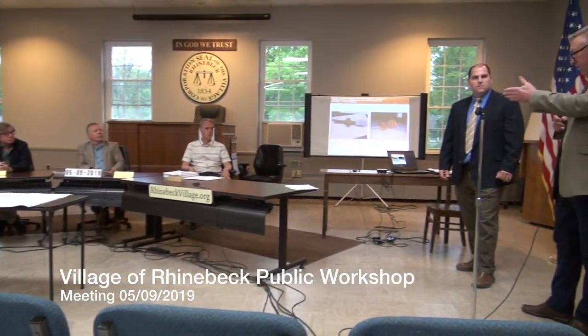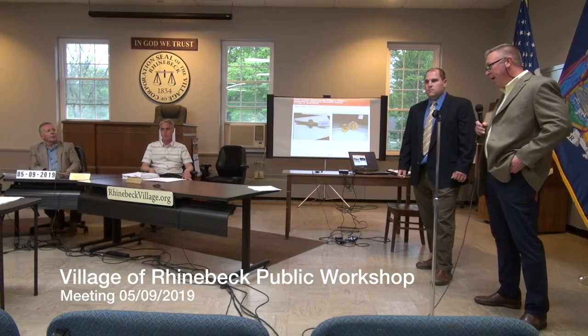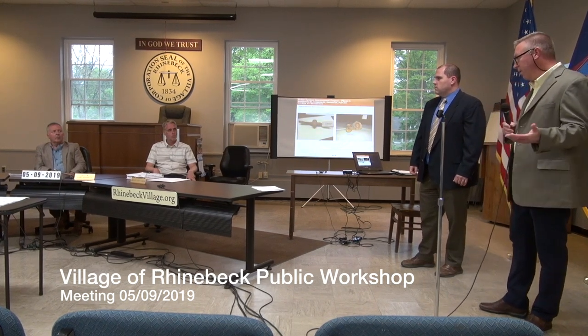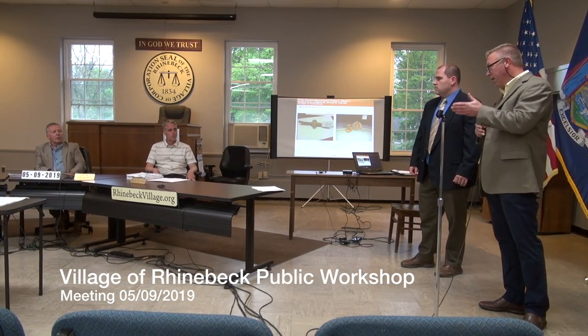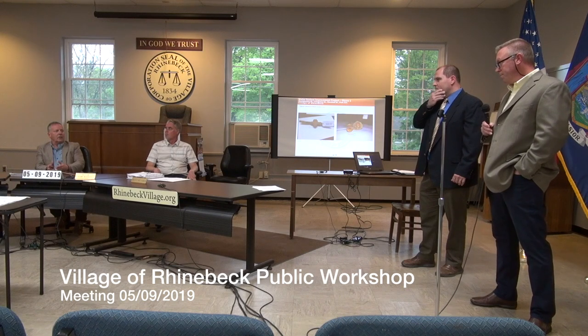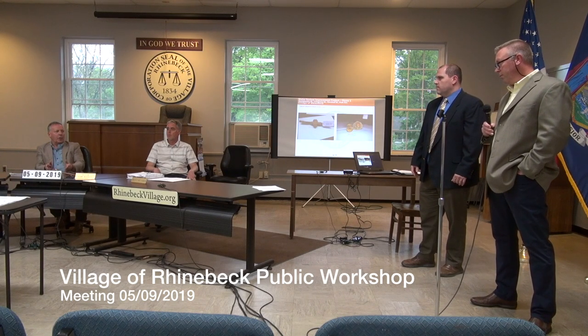Yes. And I think we should do a mailing for an affected area, a partial mailing for the people. If you're on that block, it's going to be affected for the next 3 weeks. We'll send some kind of notice, or we'll physically show up at the door. We'll include some mechanism to communicate changes such as a change in the curb box. We'll have to give some thought to how we communicate back and forth with the resident and their contractor and what he's thinking as far as the new roof, because I understand their concern. It's a timing issue for them. It's an expense, so they need to understand the timing sequence of when they need to prepare, if they have to do a new service line, and when they need to do it.